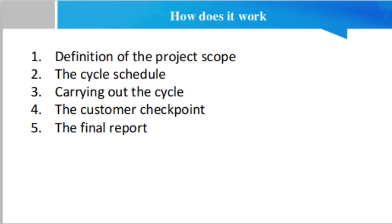It is therefore a question of determining the conditions of satisfaction. Don't forget that a project without a precise goal is doomed to fail. Obviously, the customer must validate the requirements. Then you have to draw up the Project Overview Statement, which summarizes the conditions of satisfaction, describes what will be achieved and how, and lists the risks and potential obstacles as well as the predictions for success.